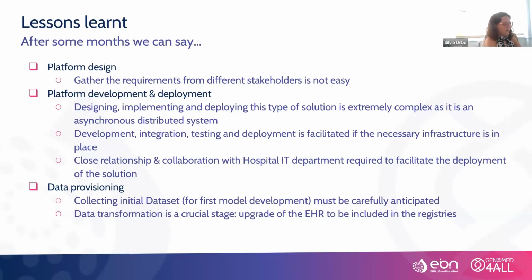Our second lesson learned that we would like to share with you is that our experience has revealed that designing, implementing, and deploying a platform like this one is very complex. So it is important to have the necessary infrastructure in place to make the development, the integration, the testing, and the deployment easier. The third one is that we have come to understand that a close collaboration with the IT department of the different hospitals is crucial for the deployment of the solution. Their expertise is essential in ensuring a smooth deployment of the solution.